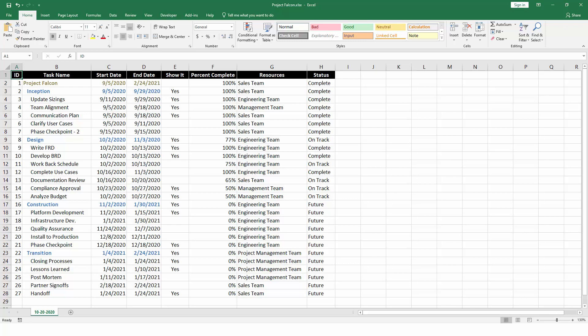OnePagerExpress is pretty flexible. It can build a Gantt chart or a timeline from an Excel file in pretty much any format. However, you do need to have the basic building blocks of a project's schedule in Excel before you can create something in OnePager. Here's what we recommend. The task name is the name of your task. Keep it short if you can. Each task should be listed on a separate row of your spreadsheet.